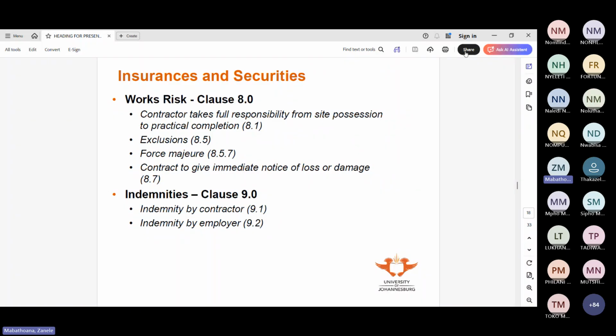For instance, if the contractor is saying, this is what you've specified, but those people have closed down, so that is no longer available, we need to find an alternative item. One of the designers, the engineer or the architect, can issue a side instruction to say, okay, fine, do not use this anymore, use that.